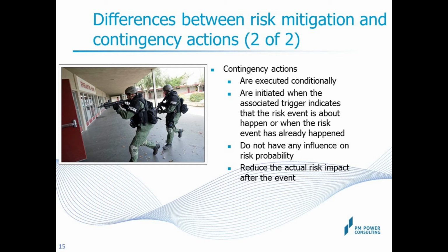So you are not taking any action ahead of time to reduce the probability of bad code. Rather, you choose to let the risk event occur and then take action after the fact. What is the risk event that has occurred? Earlier, there was a chance that the fresh developers may produce poor quality code. Now that risk event has occurred and the fresh developers have indeed produced poor quality code. Are you clear about the differences between mitigation and contingency actions?